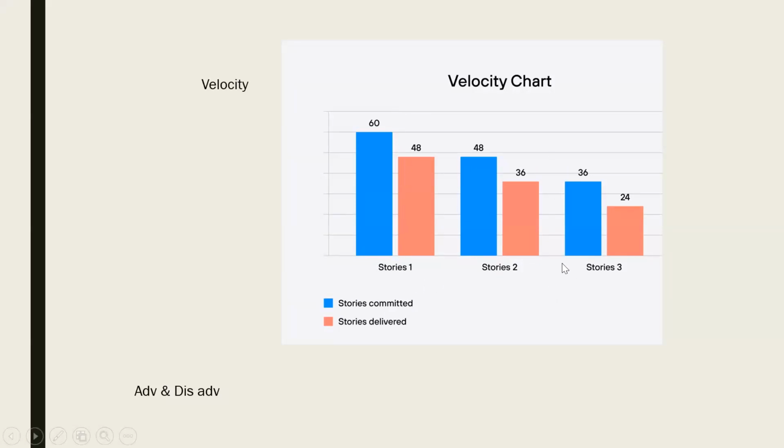One thing is that as a Scrum Master, you can check every day. It's not a meeting. A Scrum event is not there for this. No event in Scrum says to go and check your burn down charts, burn up charts, or velocity. Those are just tools to see how we are progressing towards the sprint goal. It is not saying to take these tools and punish the team. This is just to see how they are doing, and if we are deviating from somewhere, you have to bring them back on track.